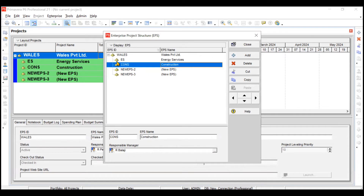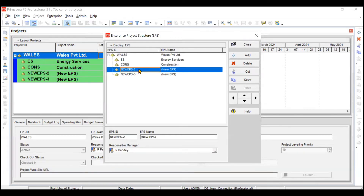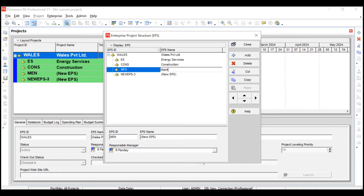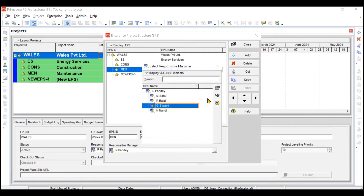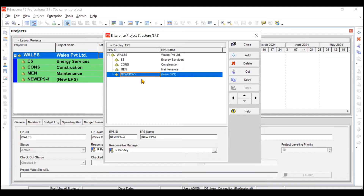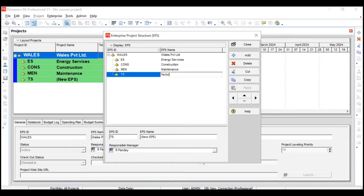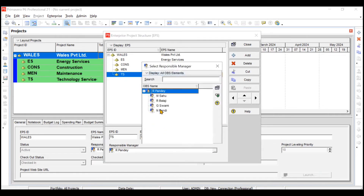Whatever projects come under the Construction EPS will by default go to R. Balaji. For example, if an IT park project is added inside Construction EPS, it will automatically be assigned to R. Balaji. The third EPS is Maintenance — ID 'MEN', assigned to G. Swami. The fourth and last EPS is Technology Services — ID 'TS', assigned to N. Nandi.